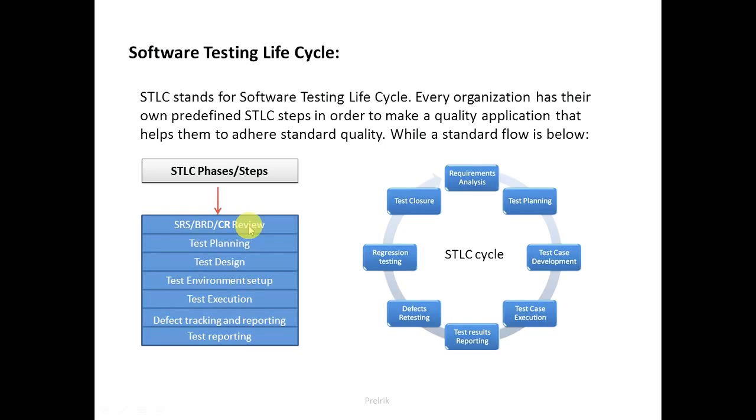In the test planning, the model will be decided, the budget, the risk, and all these things will be planned. Who is the leader, what is the timeline, what is the entry criteria, what is the exit criteria, what is the requirement traceability matrix, who is the owner, and in what cases the requirement will be moved to a further release. All these things will be planned in a test planning document or in the test planning phase. Okay, and next comes test designing.